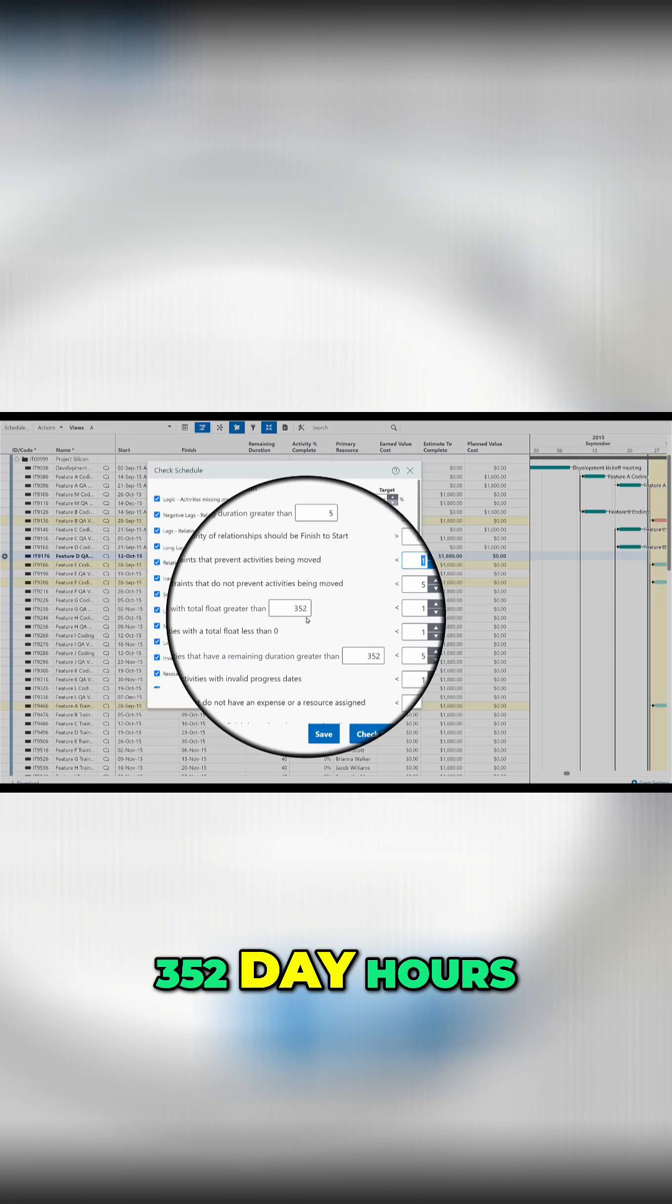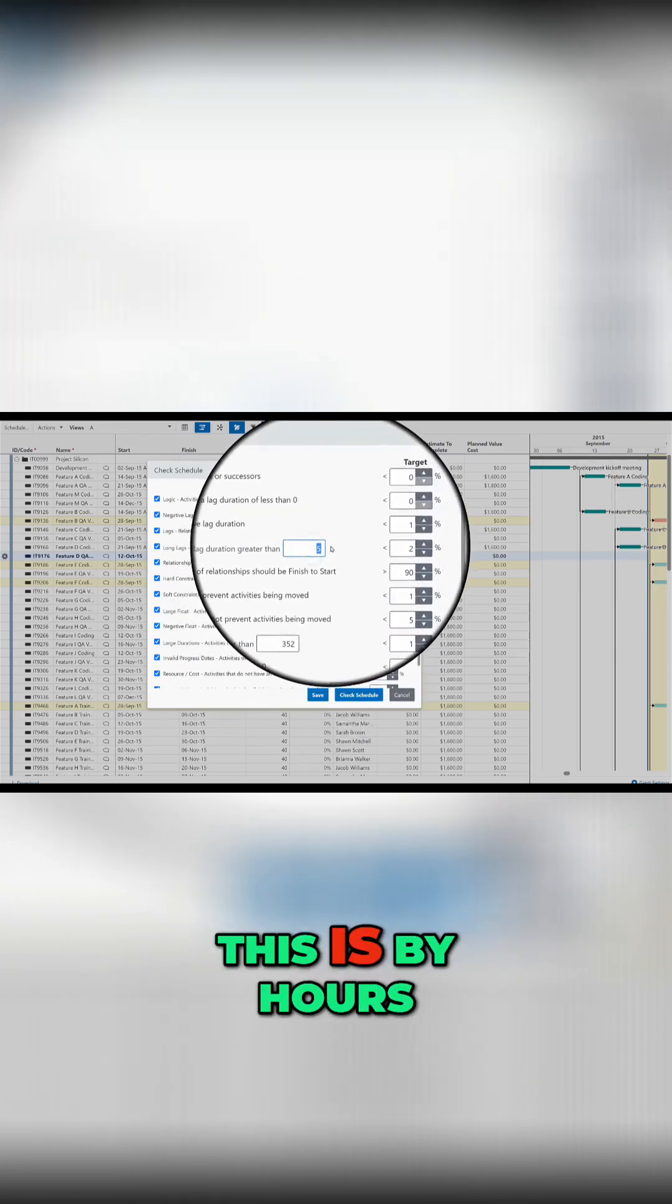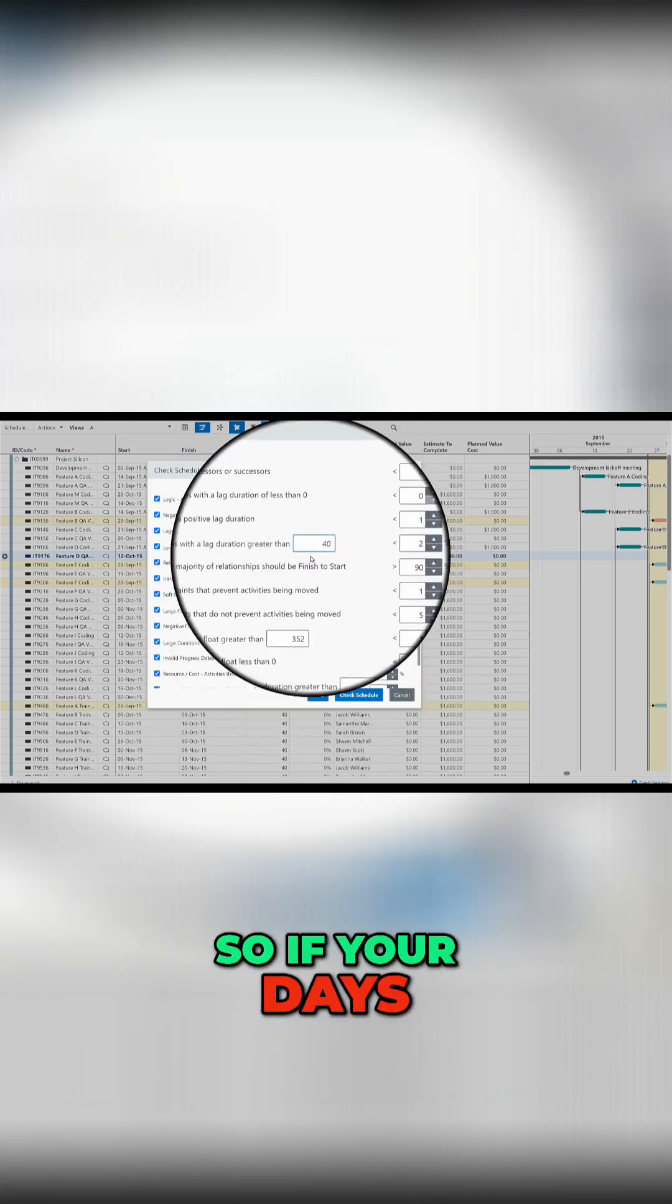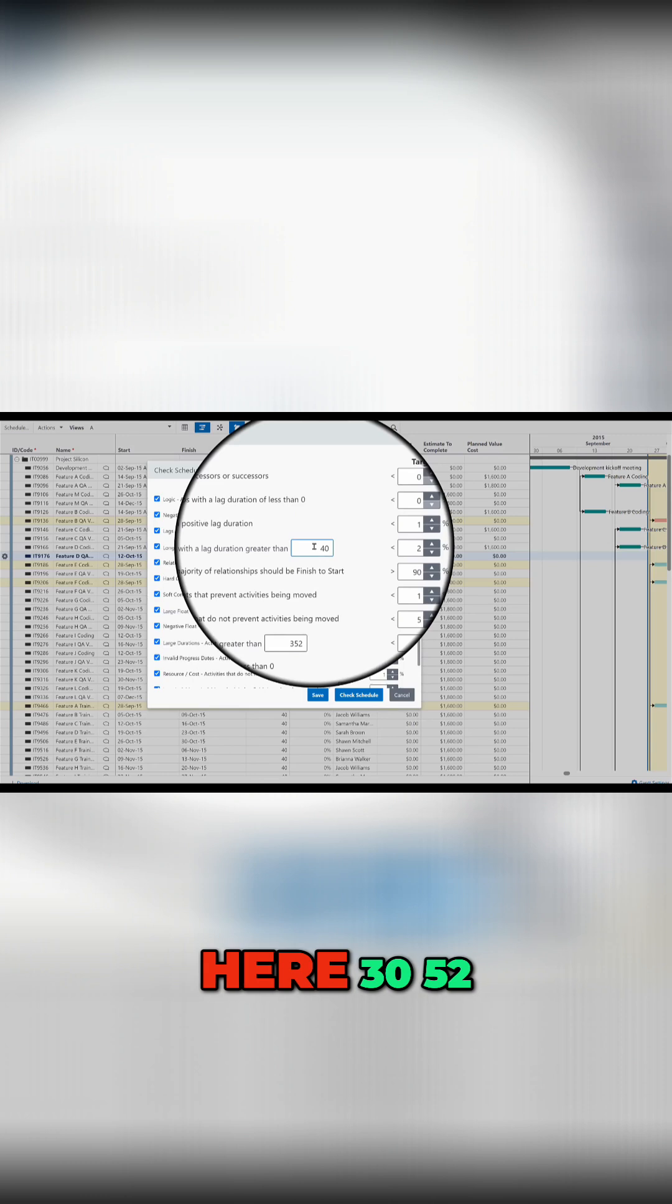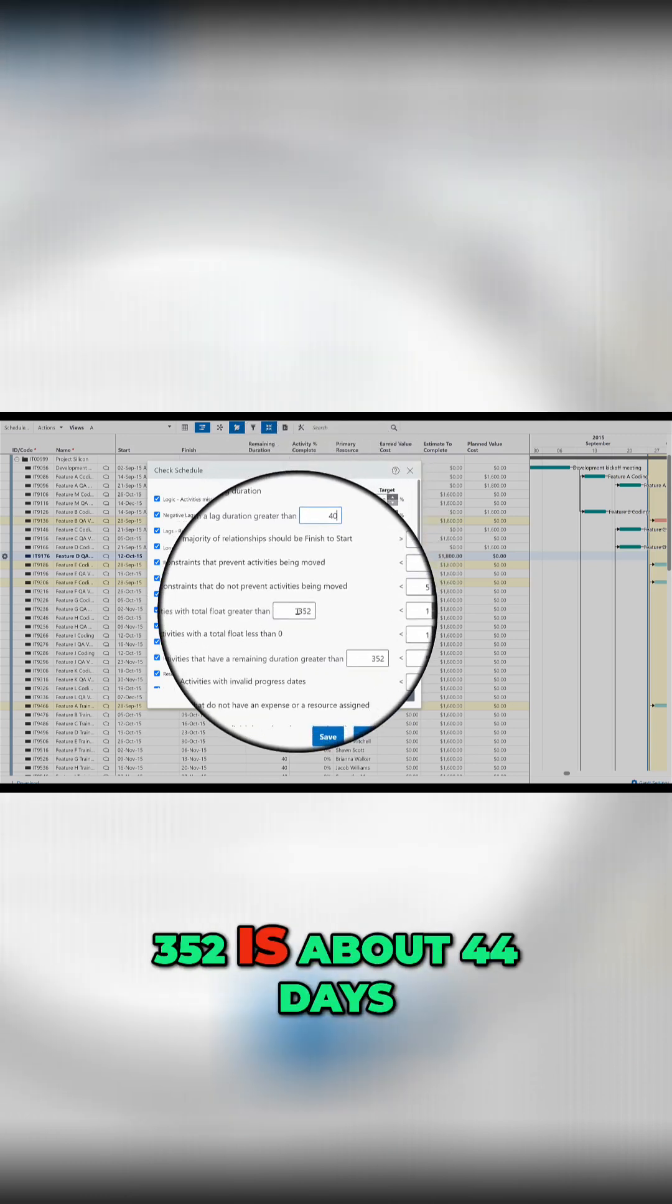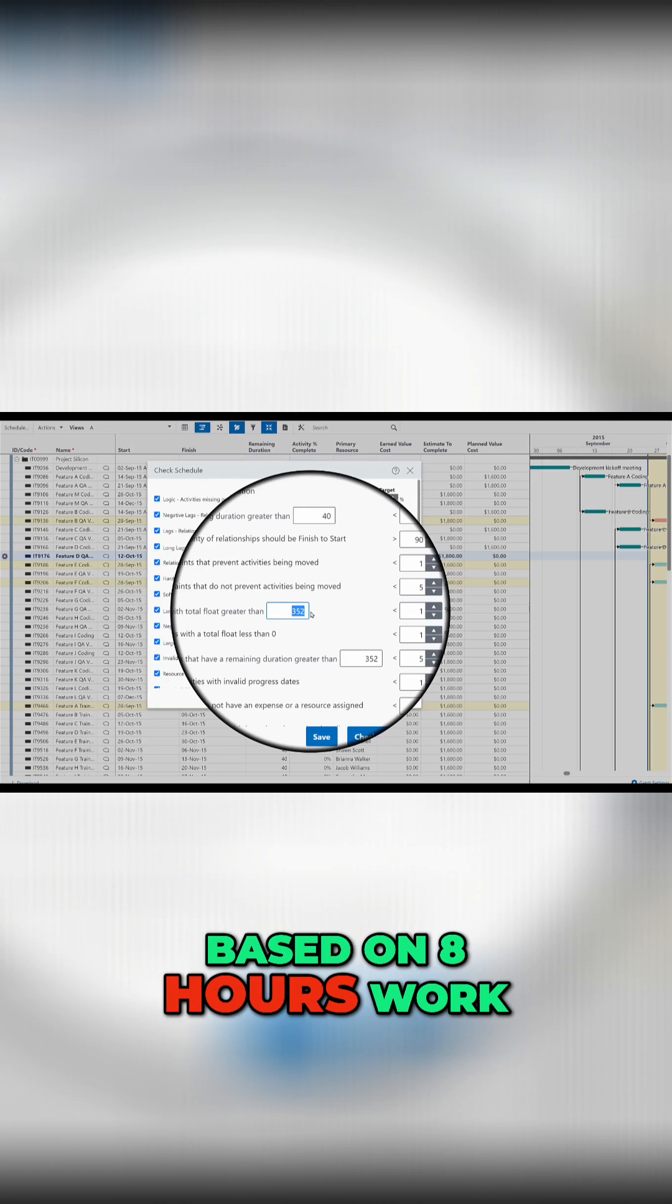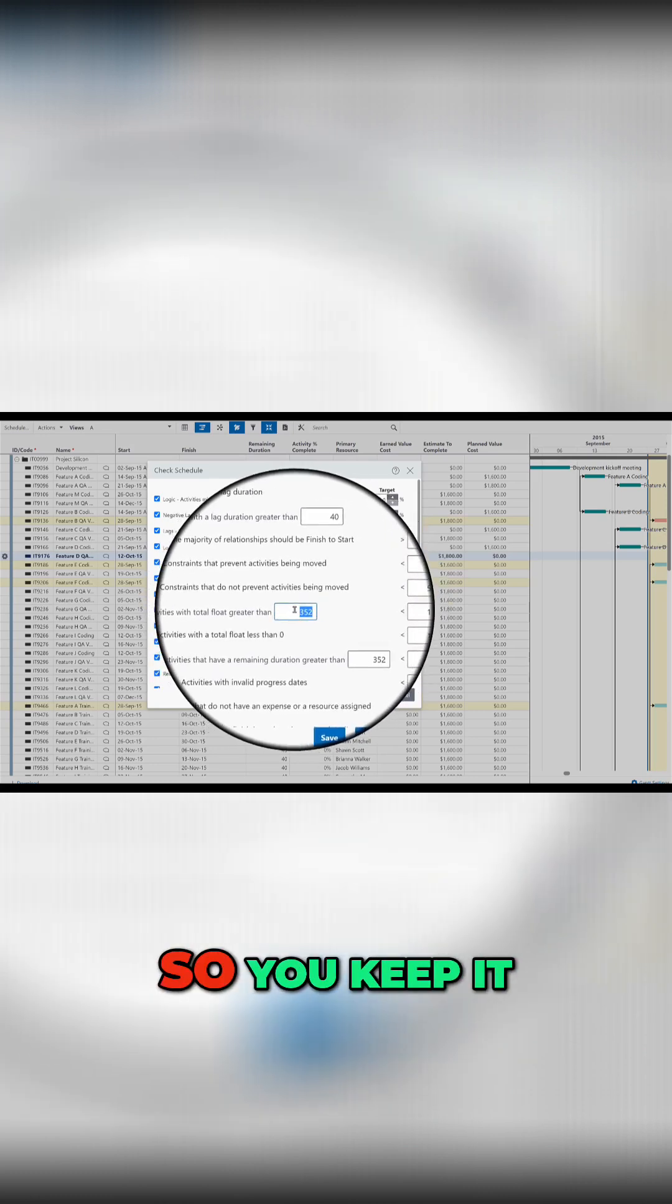Now 352 hours, sorry this should be five days, so sorry this is my hours. So if your days is 8 hours working, so it's 40 hours here. Here 352 is about 44 days based on 8 hours work.